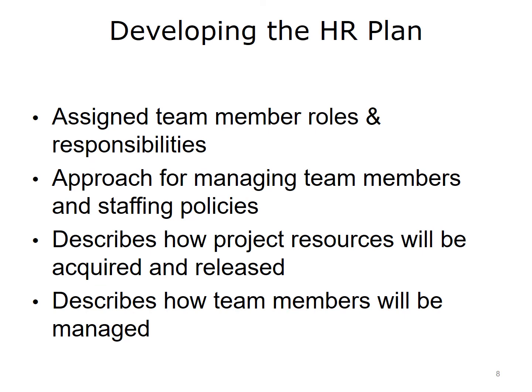There is much information contained in the staffing management plan, including a description of how staff will be acquired and released, resource calendars, training needs, how safety and compliance issues will be addressed, and how rewards will be given to team members." End quote. Resources in a healthcare IT project include doctors, nurses, clerical staff, departmental staff such as laboratory, radiology, pharmacy, occupational therapy, and administrative staff.